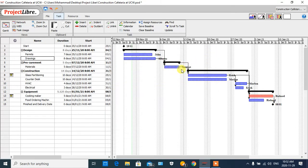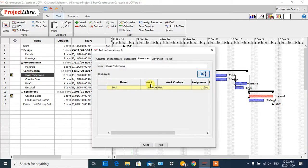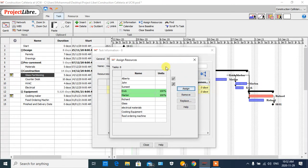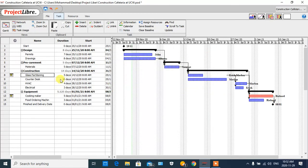In the resource section, for example in the 'Glass Partitioning' task we have a ten-day duration. I want to assign two persons here and see what happens. I can add Marlin here, and as you can see the duration of the task decreases to five days when two persons are assigned.